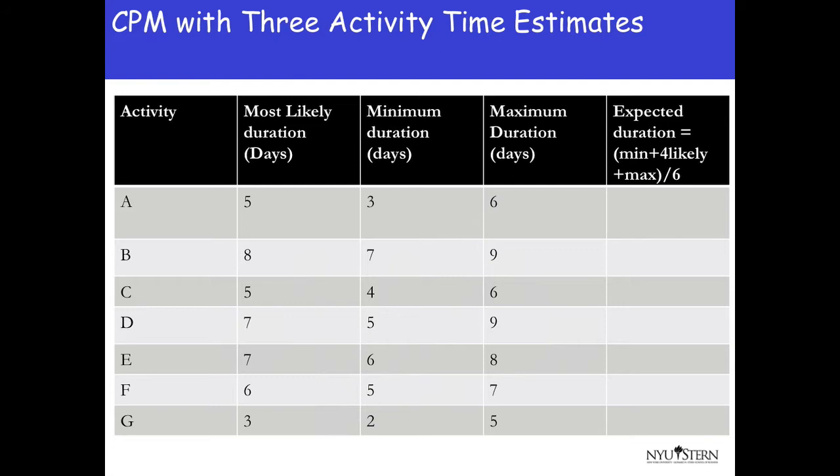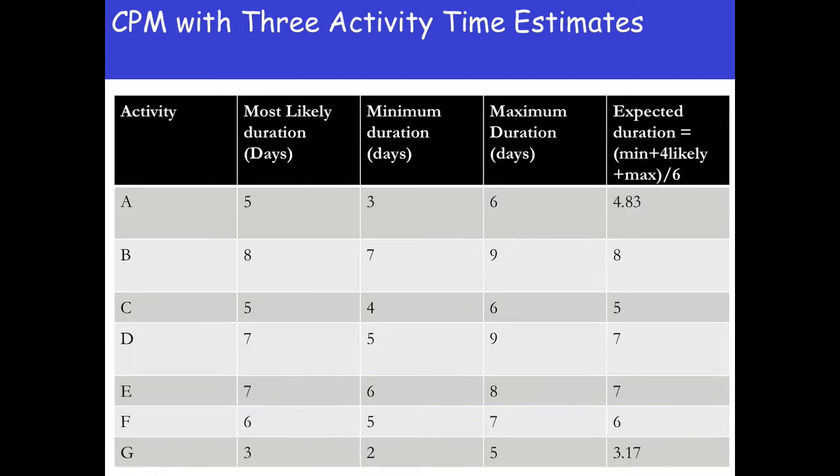To do this, we first calculate the expected duration for each activity using a weighted average according to the weights given in the 5th column of the table. Once we calculate the weights, or the expected durations, we replace the previous activity duration with these expected values.